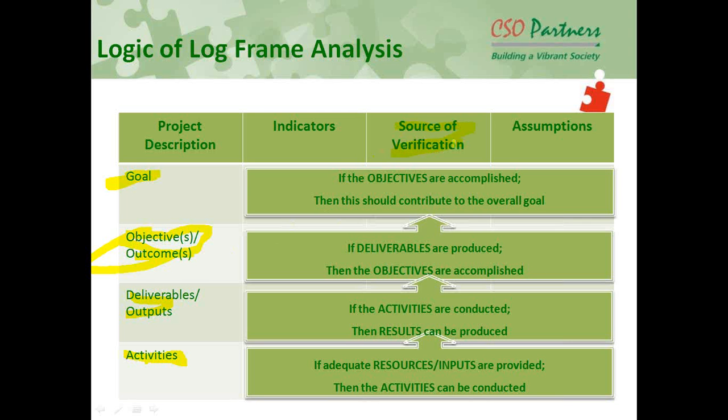When you do that, we'll talk about monitoring and evaluation. When you go for monitoring and evaluation, how do you understand how many activities are done, or how many of those 100 farmers have increased knowledge? For each indicator, you will have to mention and plan it beforehand, not later, how to maintain that information system. There might be training registers, assessments of training with score sheets, photographs, and project reports. So what exactly would be your sources of verification?